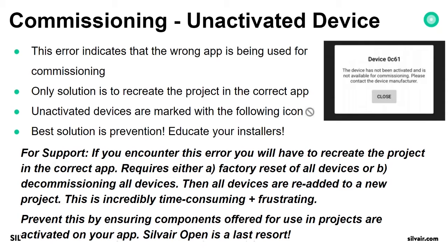So we have special keys on the devices which distinguish the application brand which should be used for such devices. So for example, you can buy products from Macmon, and if you want to use them in Zumtobel or Osram applications, you would need to contact the manufacturer to enable devices for such specific application.